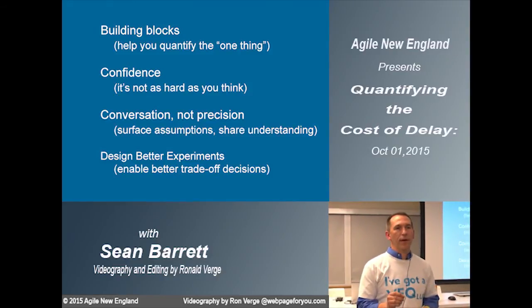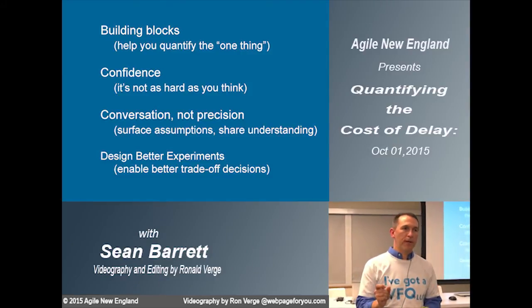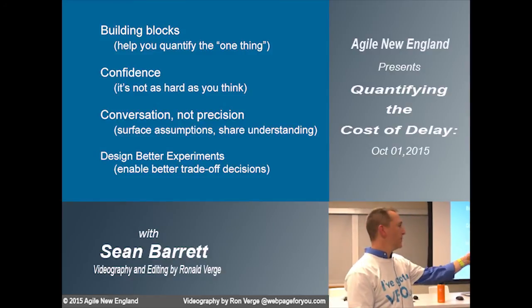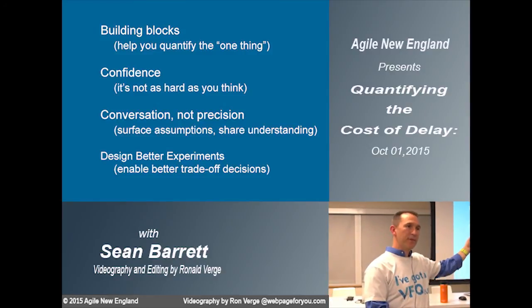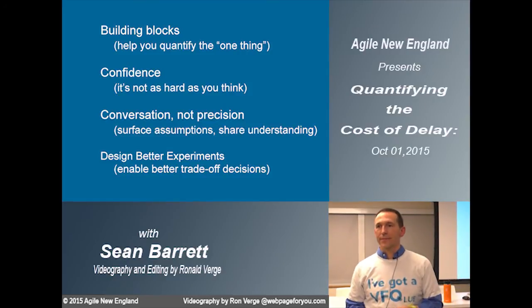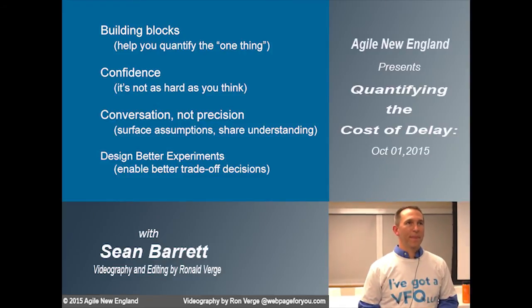So if you can identify where your greatest uncertainty lies, invest just a little bit of time to lower that uncertainty and decide, is it on the $1,000 end or the $1 million end? And if it's up on the million, keep investing. And if it's not, dump it. Just ignore it and move on, because there's going to be a better idea out there.